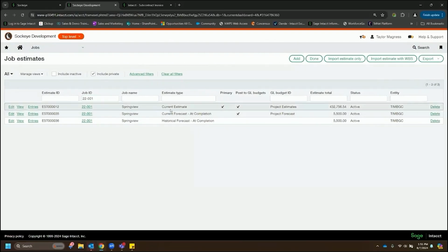So in this case, we do lump forecast into this estimates bucket here, but we can track all that history there. So as we have historical forecasts, we can keep those within the system and have visibility into some of those changes. So in this case, I've got my current, this might be my original, and then I've got forecasted cost to complete, cost to completion, whatever it is we're trying to capture there. We can maintain all that history.